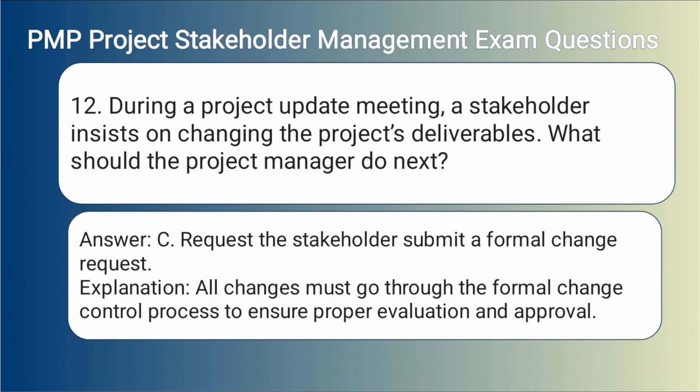Answer: C. Request the stakeholder submit a formal change request. Explanation: All changes must go through the formal change control process.